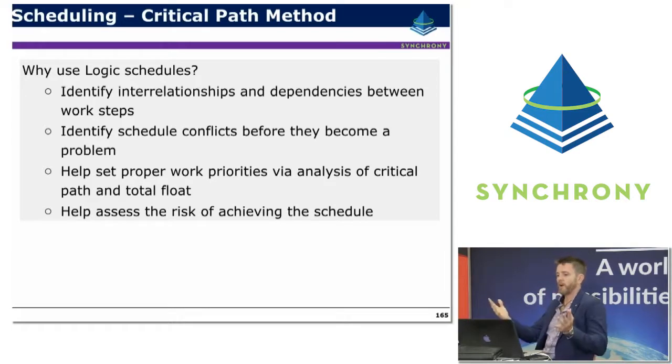So first of all, why do we use logic schedules? Logic schedules are really fundamentally important, particularly on complex projects where it's just too difficult to put lines against a page and forecast. It's really important to have that appreciation of the knock-on effect and the interdependencies between different activities, so that when a change does occur and that change is updated in the schedule model, the knock-on effect really flows through nice and quickly.